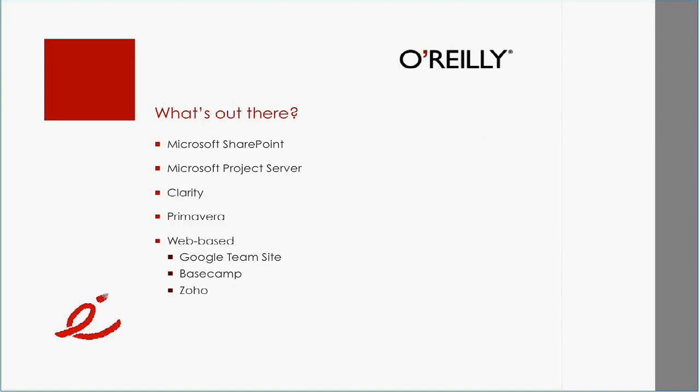Now, what's out there? I mean, obviously, I won't tell you SharePoint's the only solution. There are a lot of solutions out there. I'll talk about SharePoint briefly, but Project Server, right? It's a great solution, don't get me wrong. My company, we help organizations roll out Project Server, but what's the catch? Project Server, unlike SharePoint, has a lot more features, very sophisticated, but the catch with Project Server is it assumes your organization is very mature in your project management process.